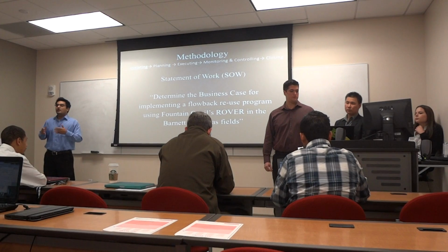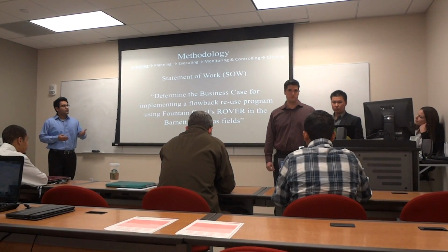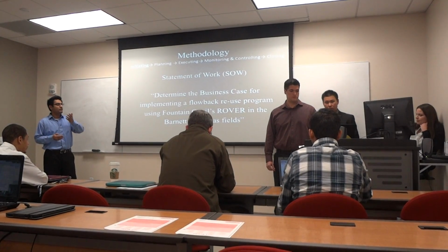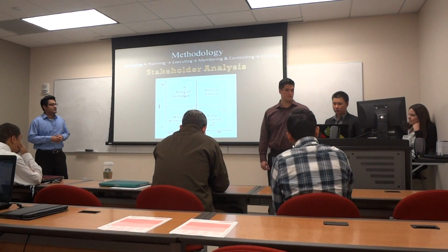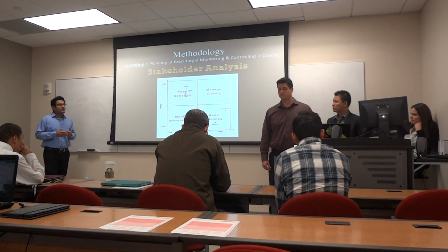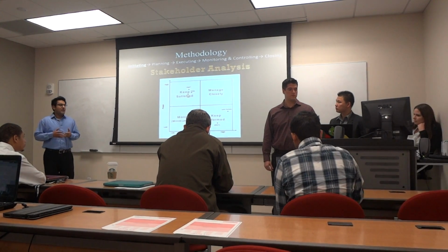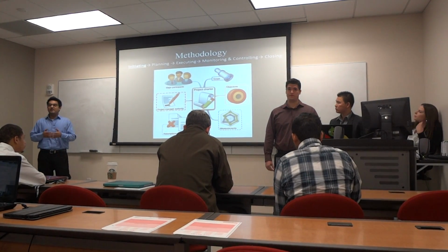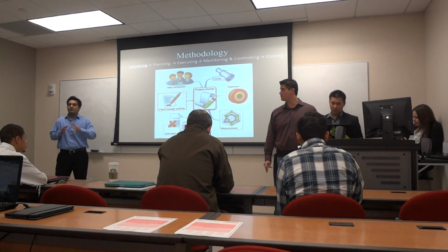Okay, so once we settled on our technology, it was easier for us to develop our statement of work. Our statement of work was to determine the business case for implementing the flowback reuse program using the rover technology for the Burnett Shale gas fields. Now, we also had to make sure that we identified the stakeholders for this project. It was a major step because we needed to identify the major players, and we needed to make sure that those people are kept in check throughout the project.